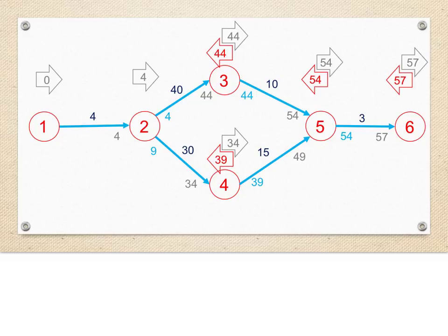Now, since we have two tasks flowing backwards into event 2, we choose the least or earliest latest start time to control. So we get a latest finish time of event 2 of 4 days. We then subtract the 4-day duration of task 1-2 and get an LST of 0 days, which then ultimately becomes the latest finish time of event 1.